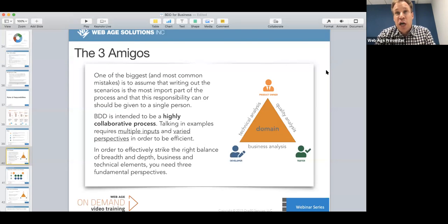So if you give a development team a half-baked story with half-baked acceptance criteria, that's exactly what you're going to get in return. And that's why stories never make it and fail early on, because the requirements and the acceptance criteria were not defined ahead of time. So in order to save time in the long run, you might have to spend a little more time upfront with the three amigos defining your behavior-driven acceptance tests.